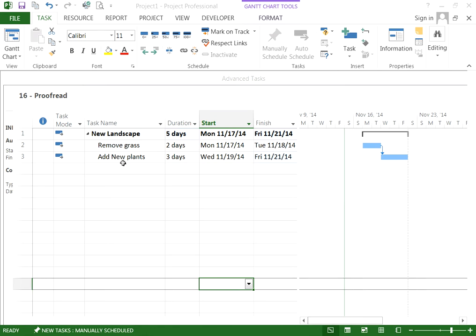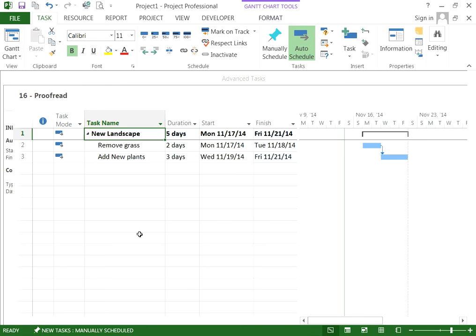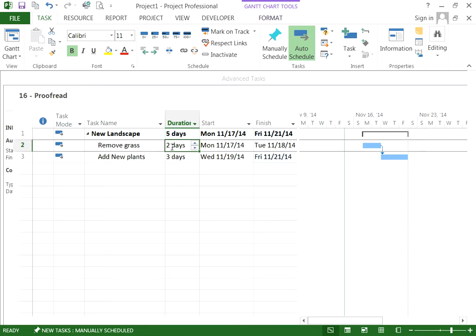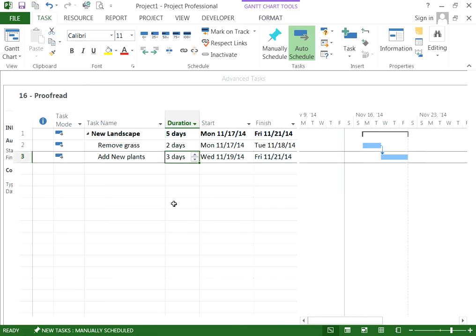For example, we have a new project to add new landscape to a property. It's a total duration of 5 days: 2 days to remove the grass and 3 days to add new plants. However, our vendor only has a certain amount of plants, and there's going to be a delay in the delivery of additional plants. So we want to split this task and add a 2-day lag so the work can continue after 2 days. We can either do it by a lag or just add an interruption.